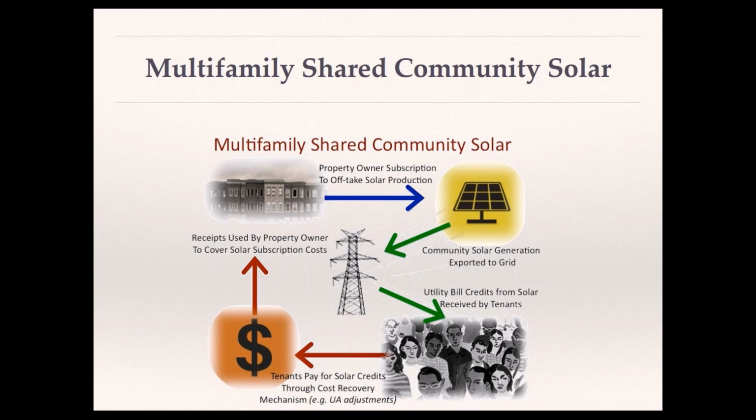The agreement that occurs, an important note here, this is an area where you're likely to need approval by HUD or the funding agency to move forward with a long-term agreement. And on this point, I would just say that there is certainly a lot of precedent for HUD approving these long-term agreements.